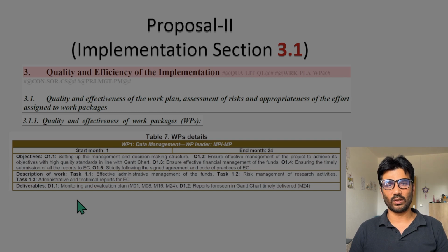But the milestone was getting their single crystal structure and a complete study of their electronic and magnetic properties. A milestone is when you really feel you have completed at least 1 objective, and then you can, for example, submit a paper on that finding or all the study that you have completed. That's a kind of milestone. That milestone should not be too many.